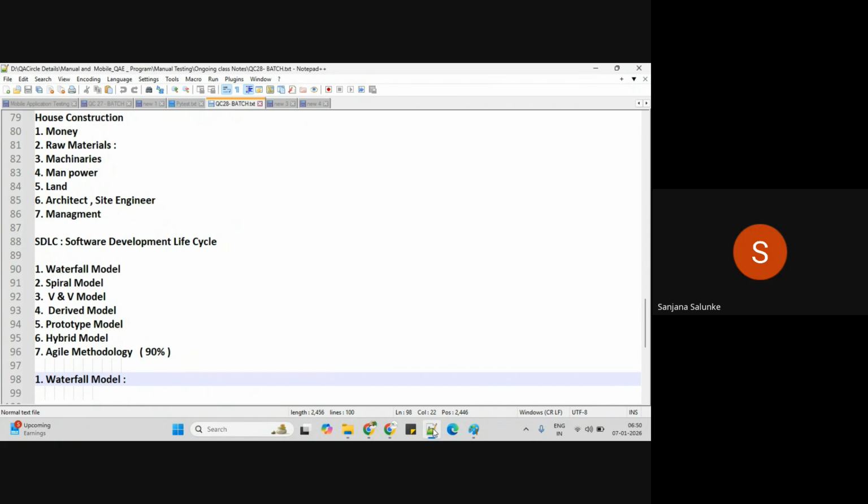Okay. Like architect, he will help us to do technical feasibility study, which means once we get the requirement from the customer, architect is the person who tells us whether we can develop this project. If yes, then what kind of tools and technologies we have to use. And the senior developer, project manager, they will follow architect instructions. Next, finance team will help us to do financial feasibility study, which means they will check whether we are getting a profit margin from this project as per the company policies. If yes, then they will give intimation to take up the project. Otherwise, they will ask them to drop the project.